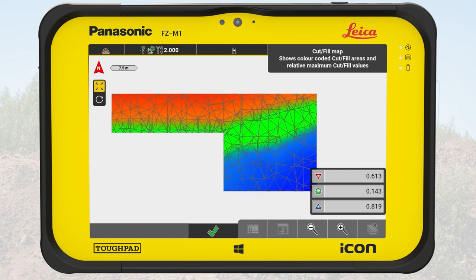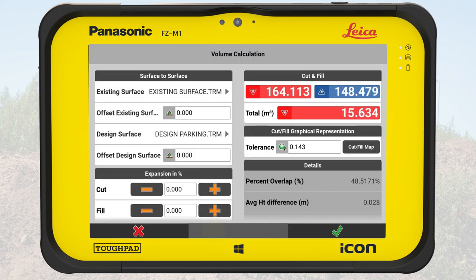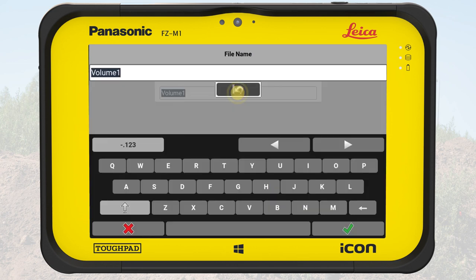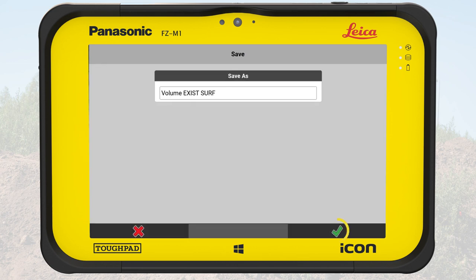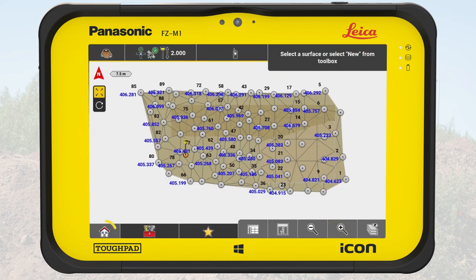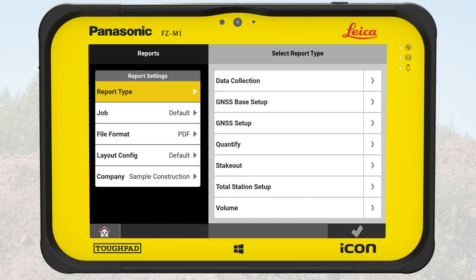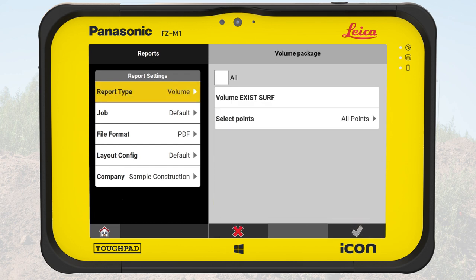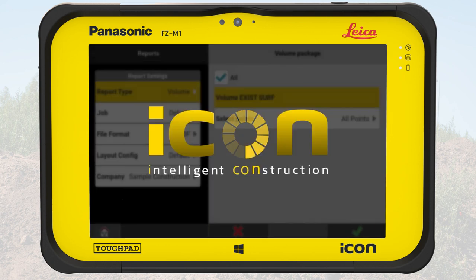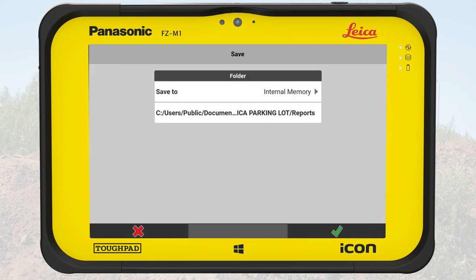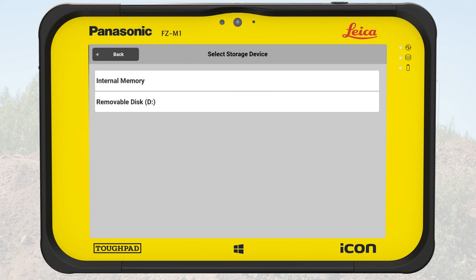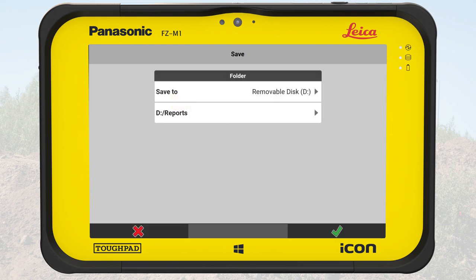A screenshot of the cut and fill map will be added to the report later. We tap on OK to close the screen. We tap OK in the Volume Calculation screen, give a name and save it. We tap on the Home button to exit Volumes and tap on Reports. From the list, we select Volume and tap on OK. Then we select the previously made volume calculation and save the report on a USB stick. This report will be handed over to the construction manager and he will use it to estimate and plan the earthwork for this construction site.